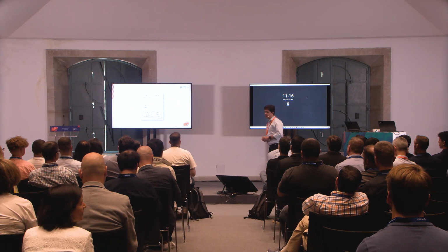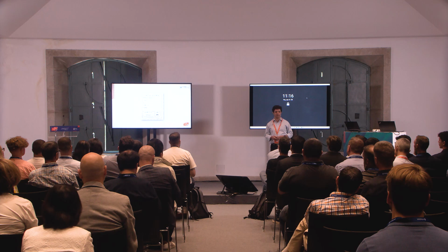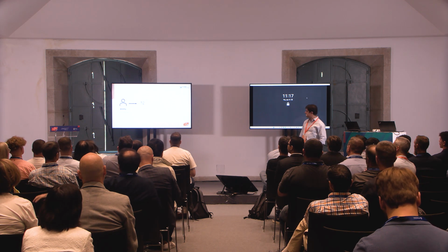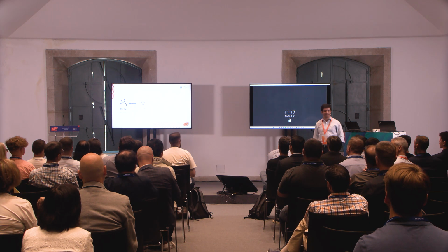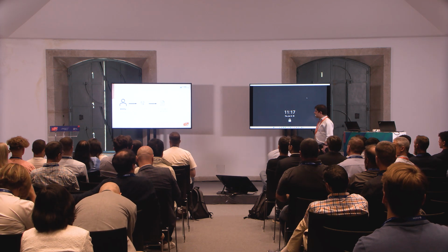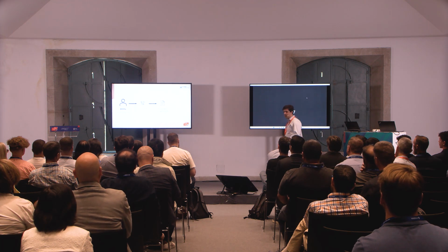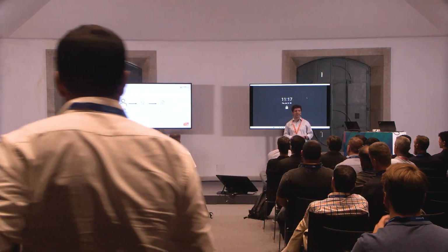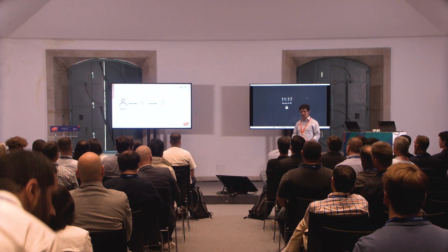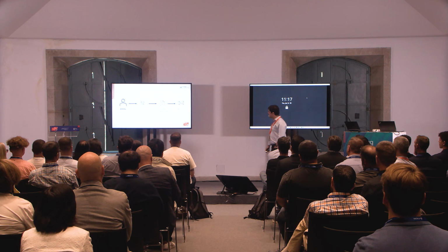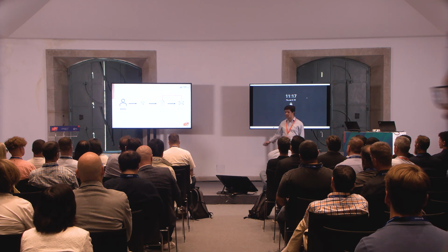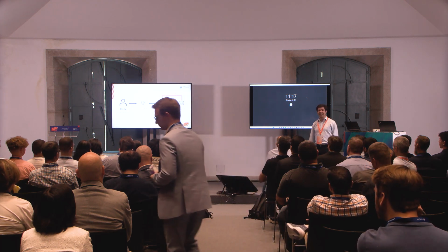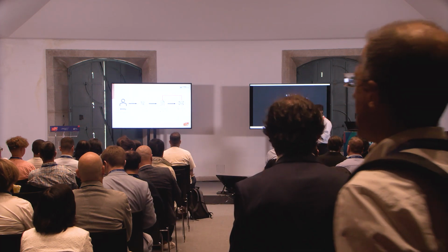So he decides to make this happen, and he will follow the standard process in his organization. So that's the story. Jeremy contacts IT, right? IT will come back and ask him to formulate a change request. There's a certain form that someone will need to fill in, describing the change that he needs and what he needs it for and so on. He'll do this, and then he sends it to IT. Obviously it will be wrong, so this will have to be reworked because it's not having all the required information, there's something missing, it's not clear, whatever.